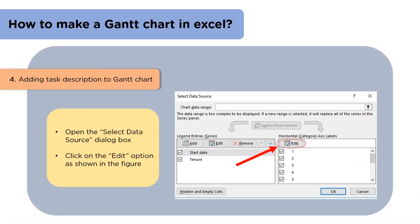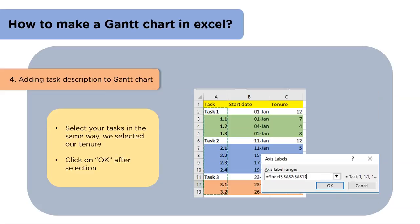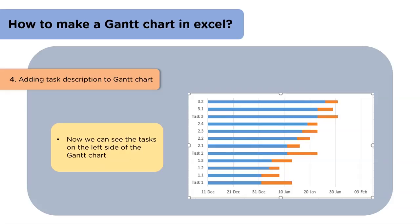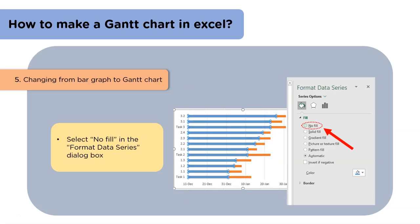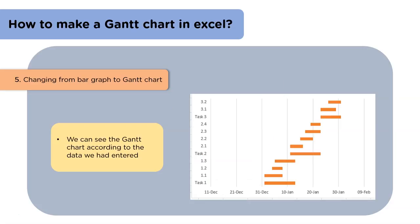The fourth step is adding description to the Gantt chart. We will open the box again and select the Edit option. Then we will select the tasks as we had selected the duration of the tasks before, and click on OK. We can now see the tasks have appeared towards the left side of the Gantt chart. The fifth and remarkable step will help us convert this bar graph into a Gantt chart. We will click on the bars and select the Format Data Series option from the menu. Then in the Format Data Series dialog box, we will select the No Fill option. We can now find our Gantt chart on the screen.